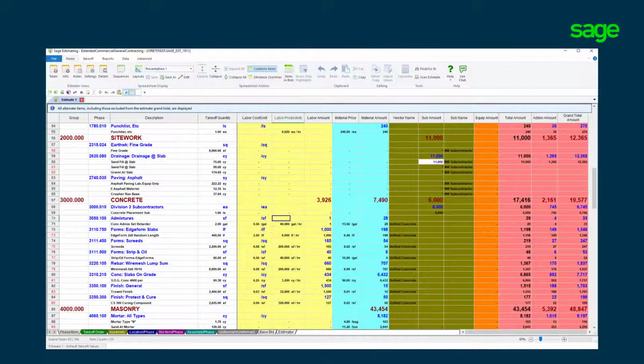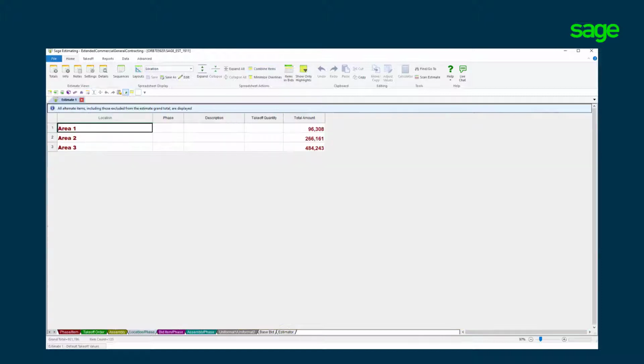I will move to the estimating application where the process begins to highlight a couple items Buyout takes advantage of to automate the process. Notice Unified Concrete is selected for the concrete materials and a subcontractor for the site work. The Buyout solution can be set to automate the grouping of these items into quote groups, increasing our efficiency. Buyout can also take advantage of location and work breakdown structures to organize how we buy out the job. Here we have broken down the estimate items by area.